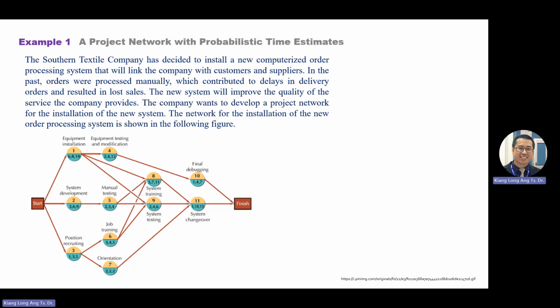After that, yesterday we also learned about the probability of the normal curve. We introduced the most likely time M, optimistic and pessimistic times. This is A, this is B. And we have the estimated time, TE. We divide by 6 because your curve is split into 6 areas. That's why you divide by 6. And on the top, you sum up the areas. So A plus 4M plus B.